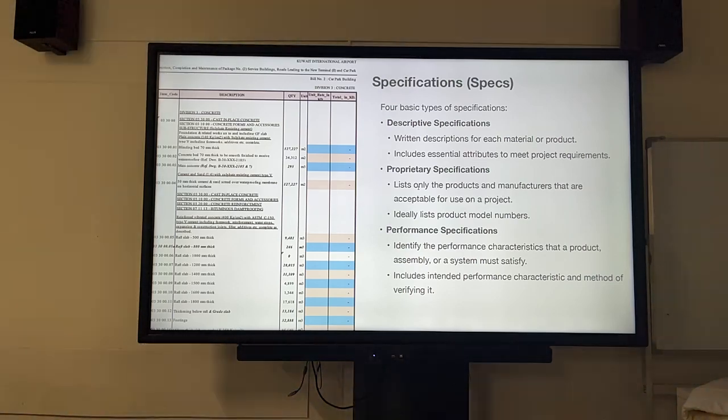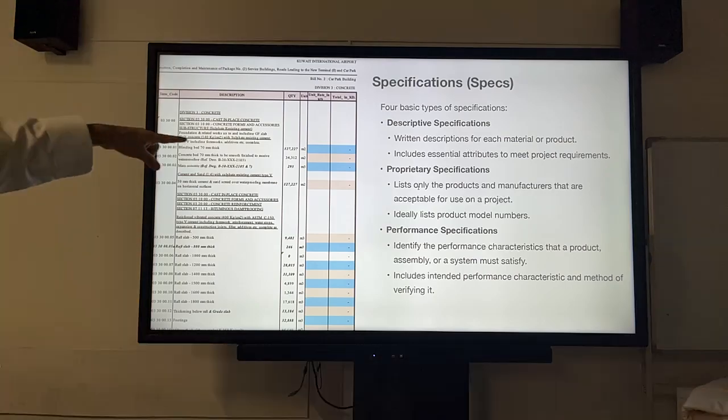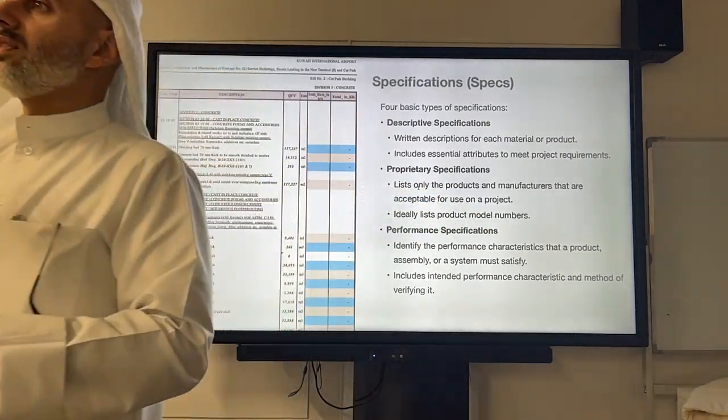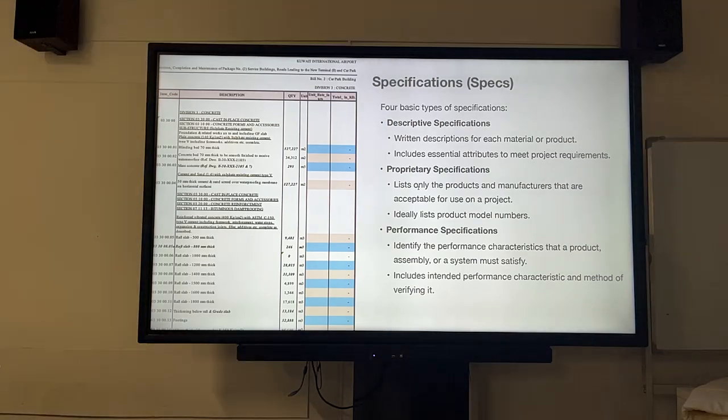But let's say it's a private client. They might say, I only want an Otis elevator built. So you put it in the specification. This is a requirement. This elevator has to be from Otis. Even better, you actually specify the actual product or the product model number. So I know that this model of elevator is sold by this company. I want this one. Or pick this model, or this model. One of these 3, so you can choose multiple products.